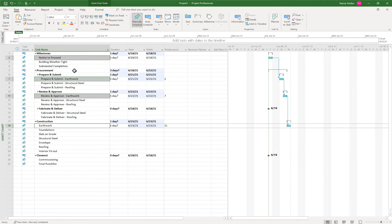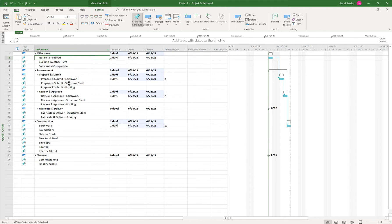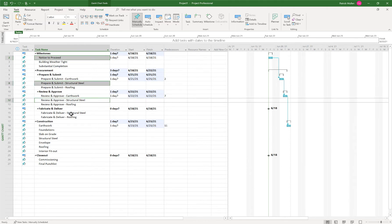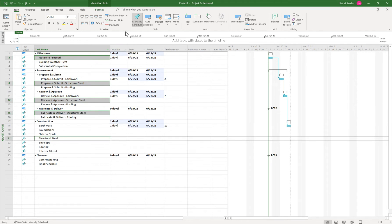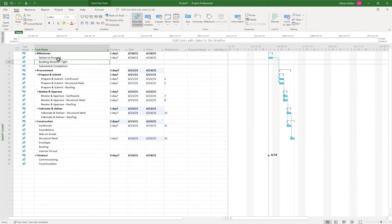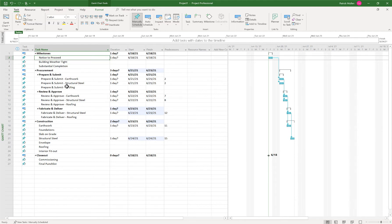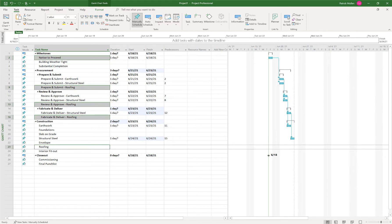So then let's do the same thing for notice to proceed. We can start with notice to proceed, then structural steel, structural steel, structural steel, and then structural steel. Let's link those. And let's start again, notice to proceed. And let's go roofing, roofing, roofing, roofing. Link those.